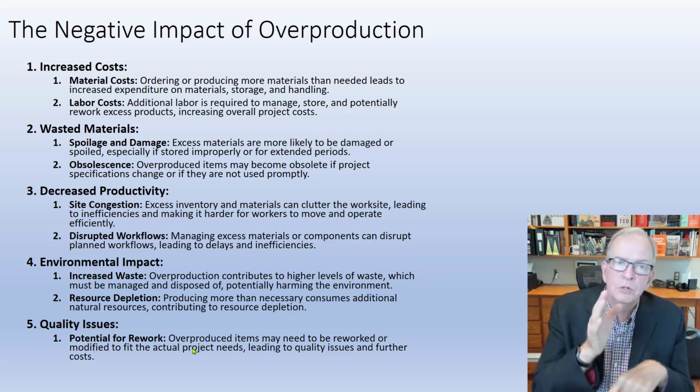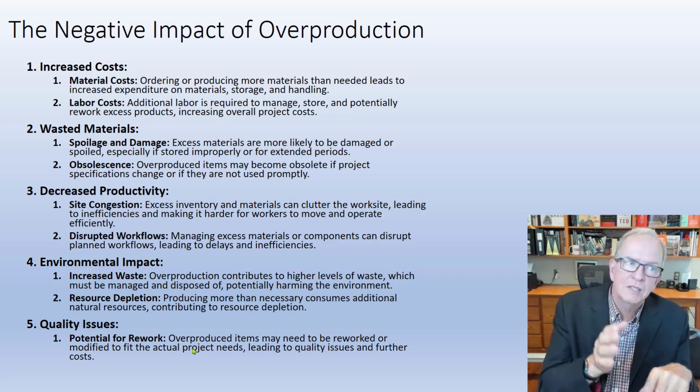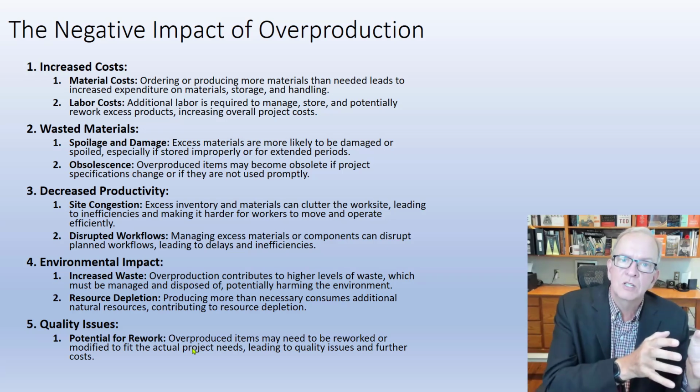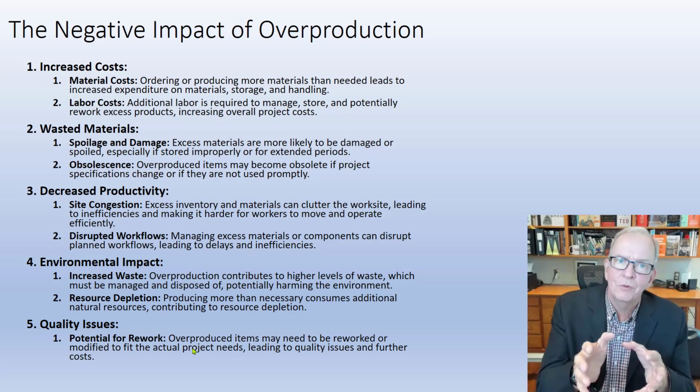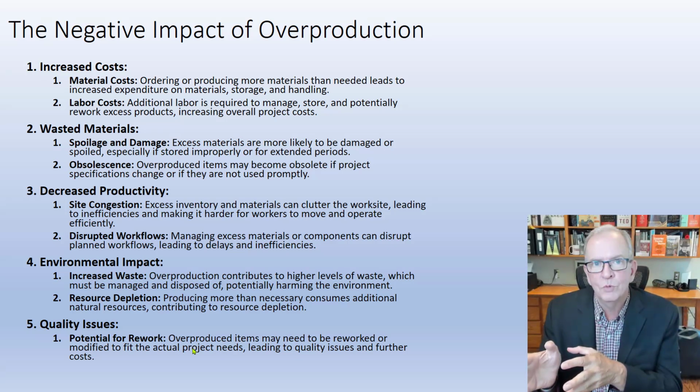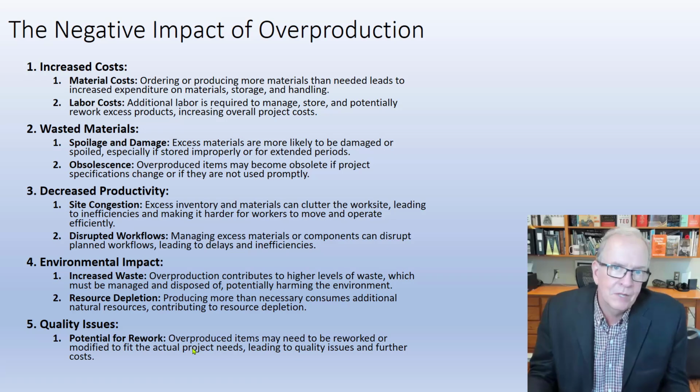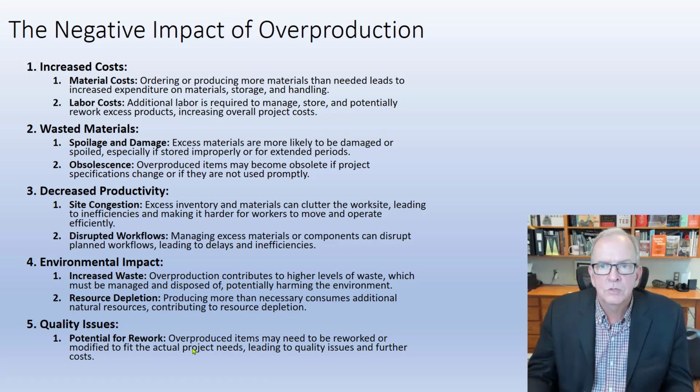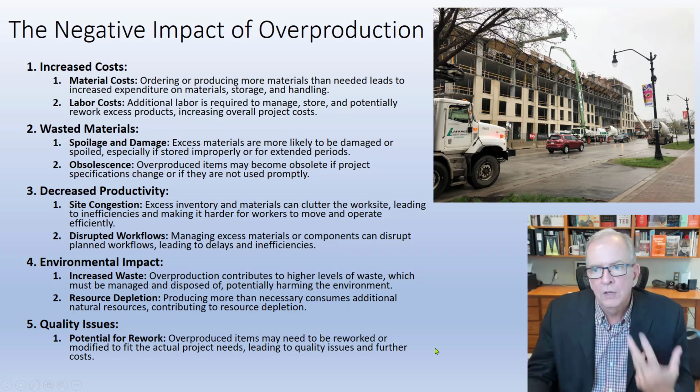So if you're producing stuff closer to when you need it, it's less likely that something is going to change the design of what you produce. That means you have to redo it, which ties to rework in the previous session that I talked about. So definitely those are examples of where we have those types of issues. And think of all the concrete.